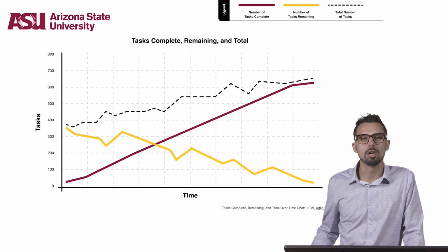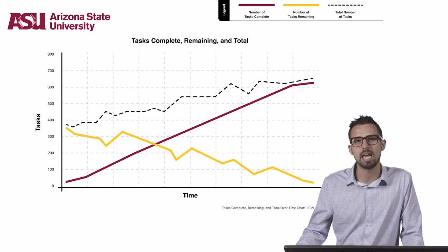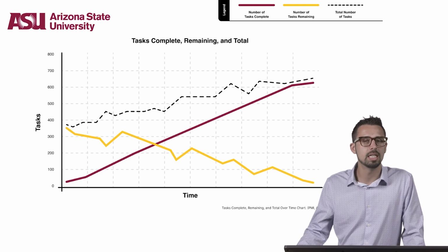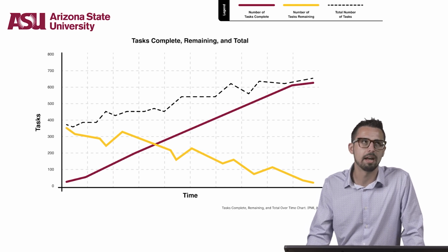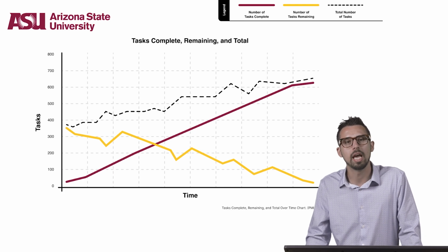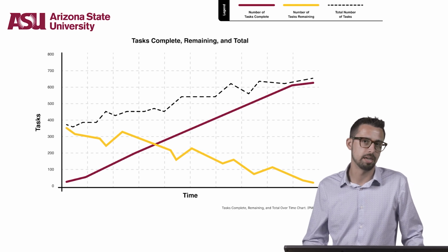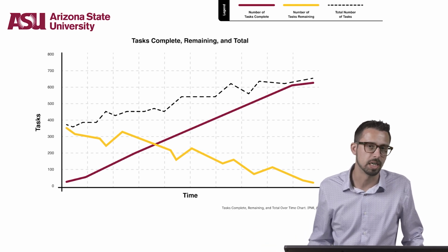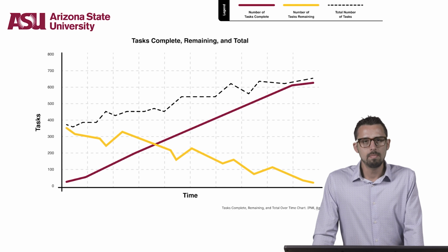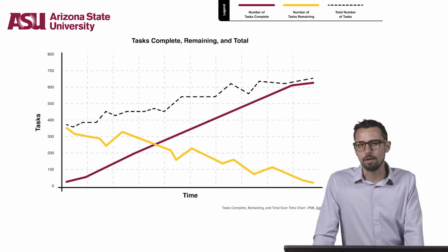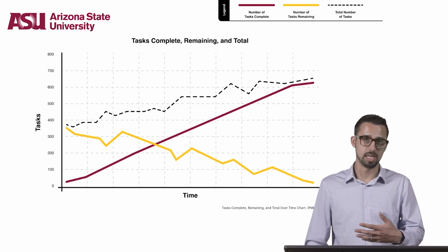When teams provide their own units of measure, they are much better able to assess, estimate, and deliver their work. The downside of relative estimations is that there's really no way to compare teams or add velocity across multiple teams. And the team can measure completed tasks in a burnup or burndown chart, or even use a variation that tracks backlog burnup, is what we would call it. And these charts are really helpful in providing trends of completion over time, as shown here.